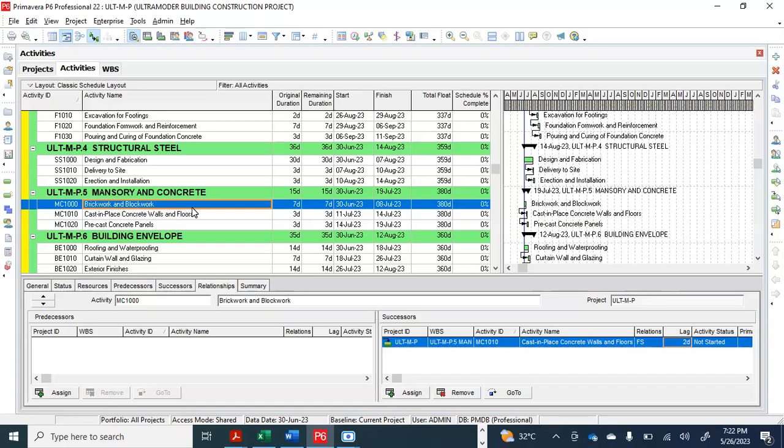You need to wait for hours, like 3 hours, for it to dry before you iron. That's why this lag time is important. You now put a lag time if it is 3 hours. However, you chained it in such a way that after you finish washing, you start ironing. But realistically, you have to put this. That's why this lag time is very important. You put a lag time of maybe 3 or 4 hours before you can now iron, because you need the cloth to get dried before you iron. I don't know if that is clear.